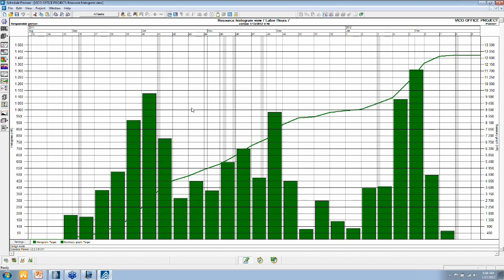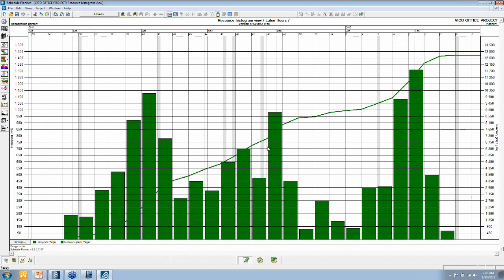It tells me where the peaks are. So it tells me for what load of resources my site needs to be prepared. If I get a peak of resources like this one here in this week, I better make sure that I have enough parking spaces and enough capacity on site for people to work.